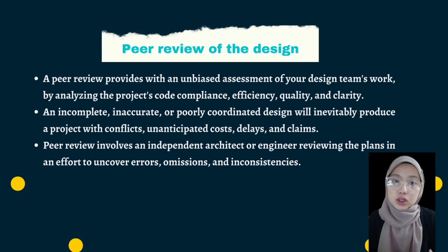Conversely, nothing diminishes the risk of conflict and provides more protection for the owner than accurate and complete designs. Peer review involves an independent architect or engineer reviewing the plan in an effort to uncover errors, omissions, and inconsistencies. The modest cost is justified by avoiding the delays, disruptions, and extra costs that usually result when design errors are discovered in the field after construction is underway.